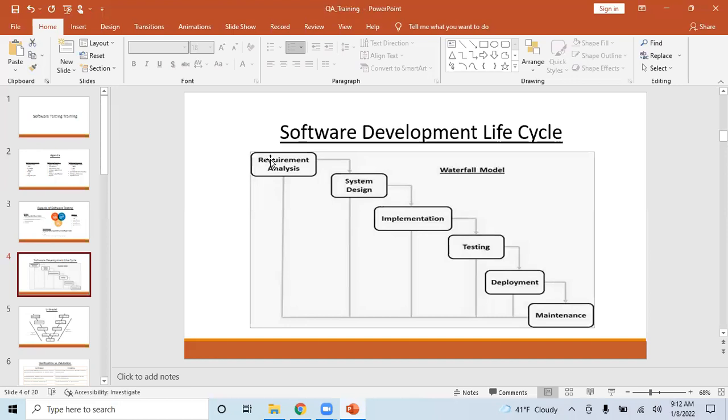When a business analyst or a product owner has some discussions with the customer, they convert those discussions into requirements. There are two types of requirements in Jira. One is called an Epic. An Epic is like a feature. They will tell you a customer wants this feature. Like shopping cart is a feature, so they'll say, I want a shopping cart feature. That's an Epic.